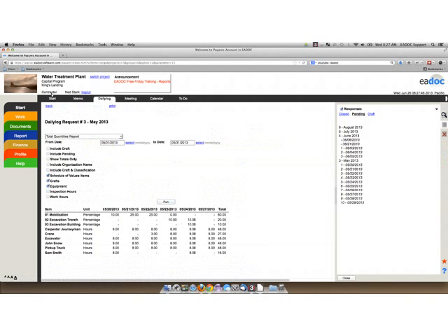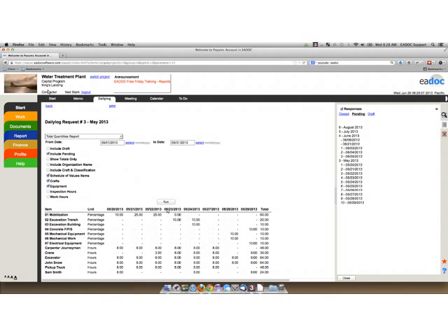That shows all of the quantities that have been approved to date. So on Dailylogs, by default, you have an approved approval cycle. In this case, all of these ones have been approved. If I check off the include pending, that's going to bring in the ones that I haven't yet approved in the system, but it'll display their number. So I'm going to click Run again, and you can see there's our 29. That's the one we created today. And you can see here I've got that concrete, and it's got a 10 value.